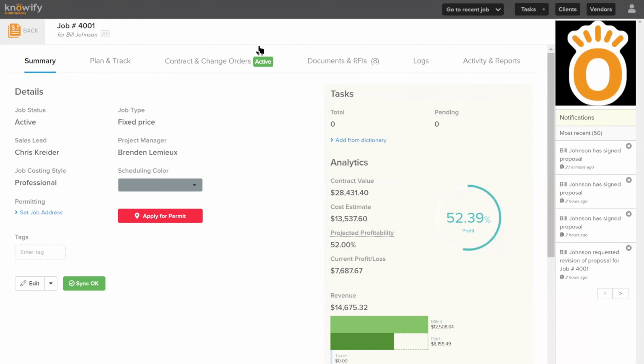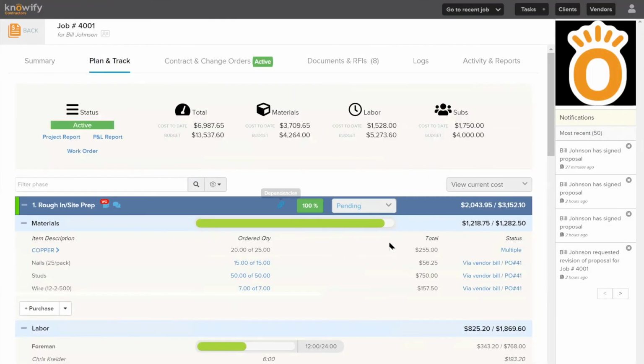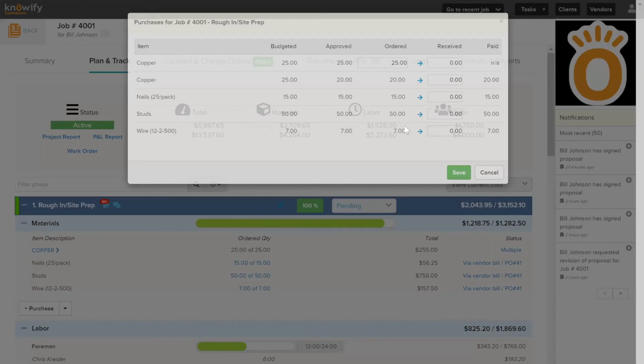Yeah, exactly. I also just wanted to piggyback on the question from before. Taryn had showed us how you can update the amount on the bill from the original PO. And then when you budget the cost of jobs, you can actually see this in a high level view here. So we can keep track every step of the way, from when you initially budget items to what items are added to the PO and then what gets added to the bill. So this way we can see what we estimated, what we wound up placing on the purchase order, and what we were billed for to help us plan for future jobs.